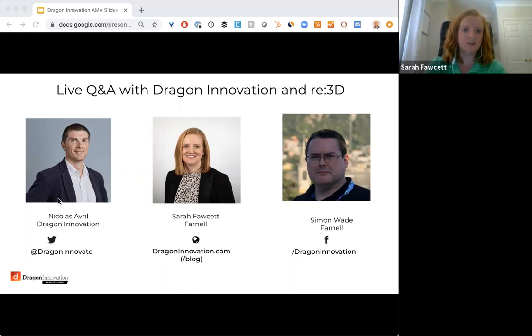Does your contract manufacturer have relationships with multiple distributors? And does my BOM have alternative components that I could change to if needed, just from a supply chain perspective? So if we take Raspberry Pi as an example, Simon mentioned earlier that there's at least 2 alternative components for most of the BOM items for Raspberry Pi, which means as a manufacturer, we can swap out any kind of component that we need to if we need to from a supply chain risk perspective. It's easy for us to be flexible and maintain the production line going.